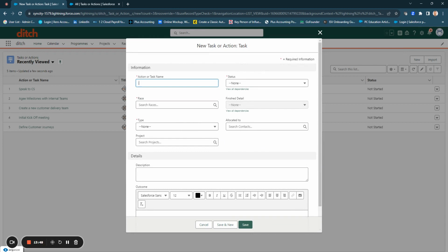And some people ask me about longer tasks. The same way that we do within Scrum, I always try and break your task down into tasks that can be completed within the time period of a race. So sometimes you might have one long task, you might actually need to break it into 3 smaller tasks that then get put into 3 different races. It just makes it so much simpler to report on.